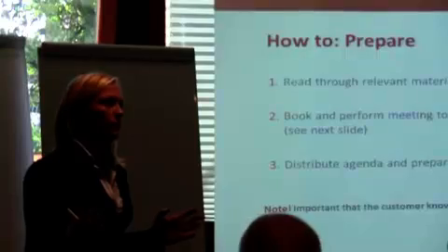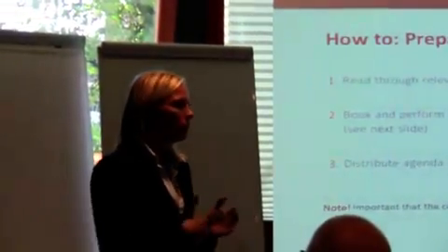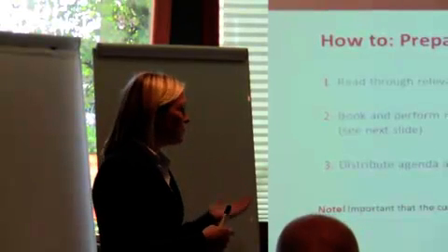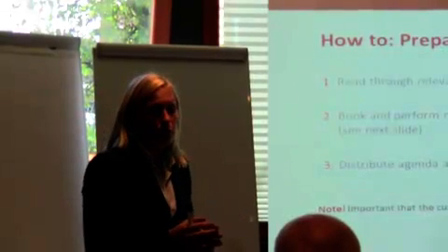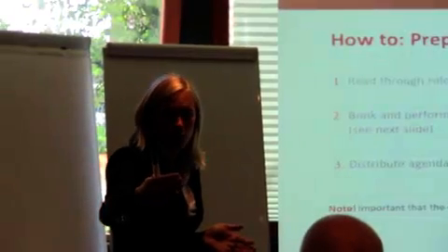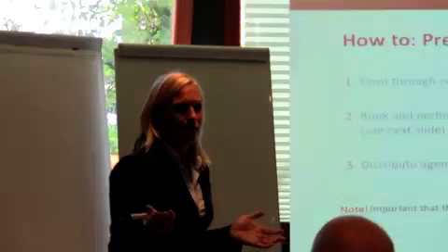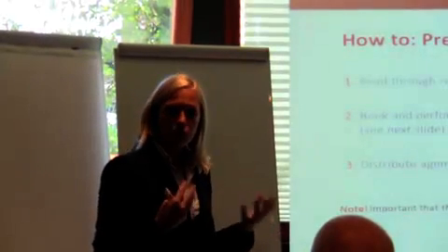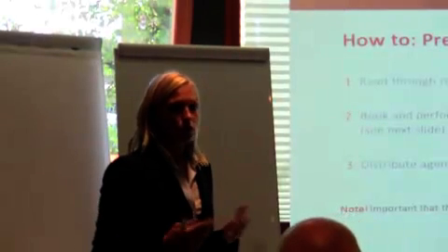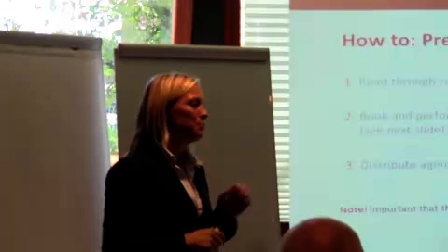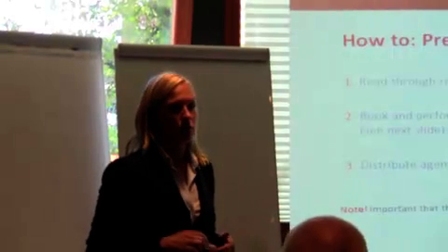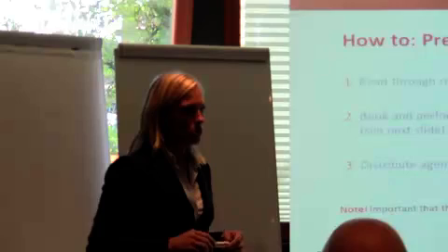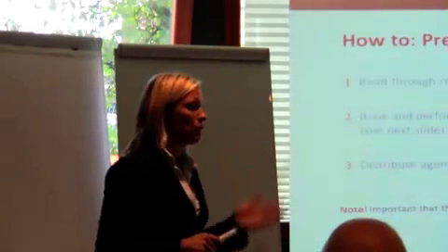And I think that's also something that we've seen over the years, that the format of the project group has differed during the project. Before, the customer normally set up, and we discussed that early in the sales phase together with the customer, a project group. And they were the same people that were present in all activities within the project. But maybe the best way of doing it is to have different people present at different workshops. Of course you can still have a project group, but then you need to have experts coming in and out of the project, giving their opinion and deciding upon important issues. So it's very, very important to discuss participation early in the planning phase of the project.